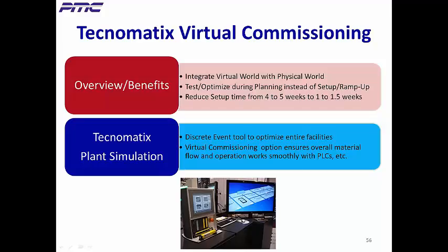One of my clients used this to check that the PLC control logic worked for their factory conveyor system, which had numerous light sensors and stops along the way where parts would wait for certain conditions before moving on. They were especially concerned about an interesting past problem where a standalone plant simulation like discrete event simulation showed that their control logic worked. But when the plant was built, deadlock conditions occurred where everything was stuck. The problem was that the simulation implemented slightly different control logic, so the problem didn't occur in the simulation.